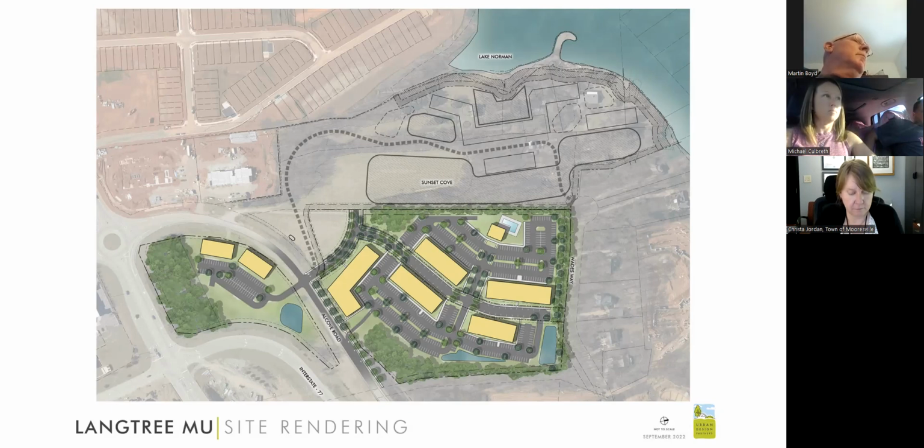It's more important than ever that we get really detailed drawings before we go out for pricing. With construction, pricing is kind of like watching interest rates nowadays. So you got to get as much detail as possible before you go out. So, you could probably say within hopefully a year after zoning is probably good. Maybe a little quicker, maybe a little later, depending on how the process goes. Okay, thank you.